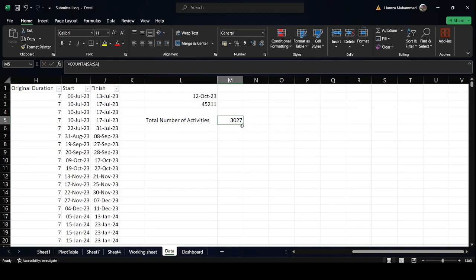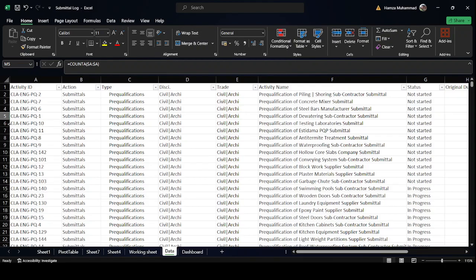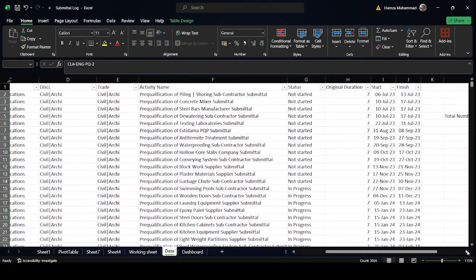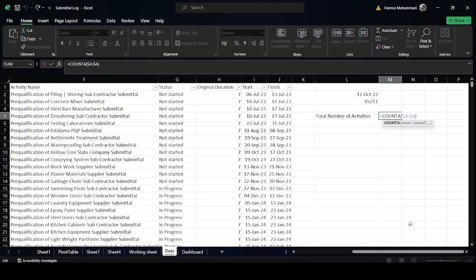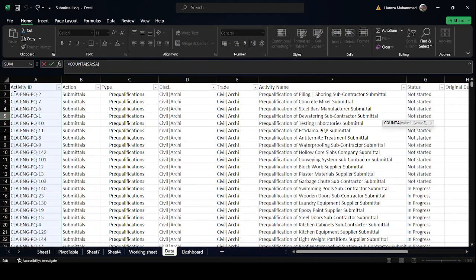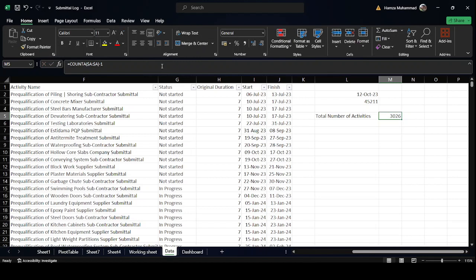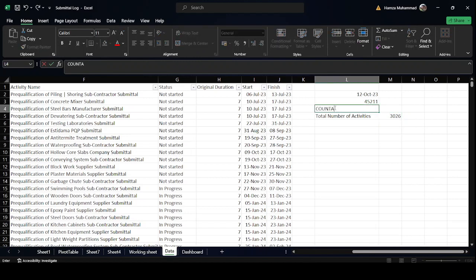The result shows 3027 records. To verify, go to the first record, press Shift+Ctrl+Down Arrow to reach the end, and we see 3026 activities. The reason we get 3027 is that the full column includes the column header 'Activity ID', which is also counted. So we subtract one from the count to get the correct total of 3026.